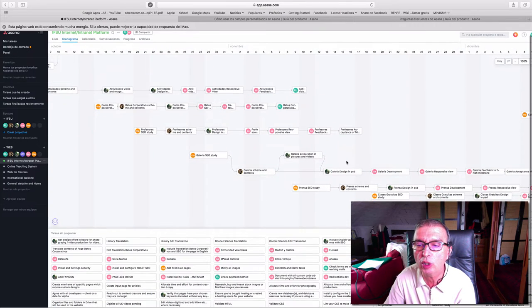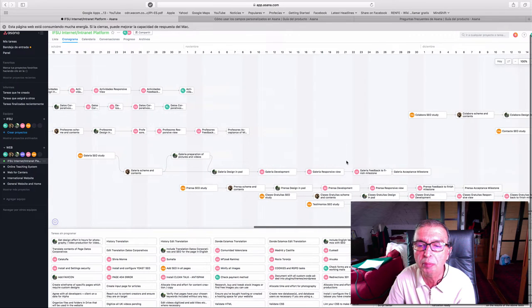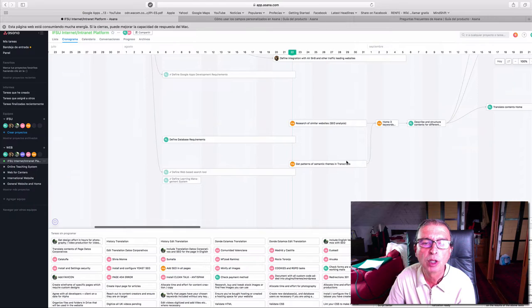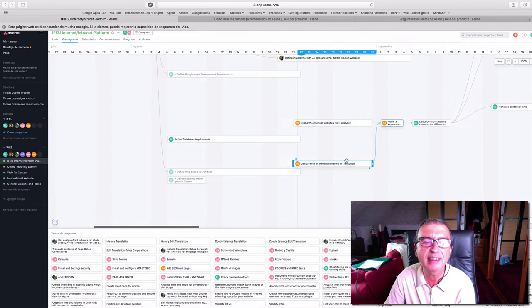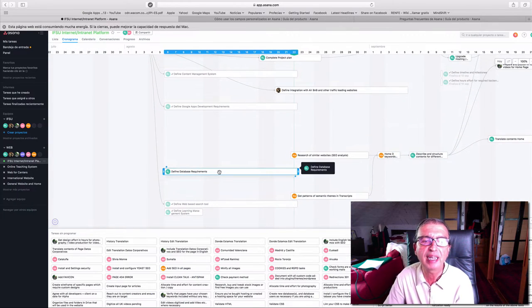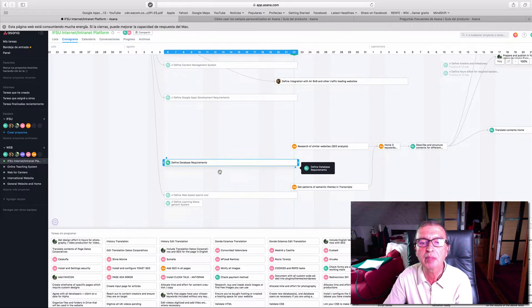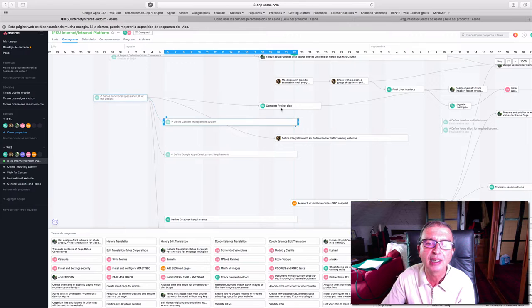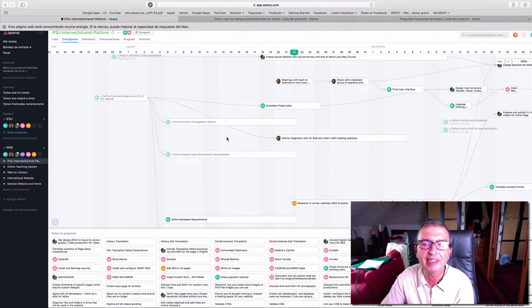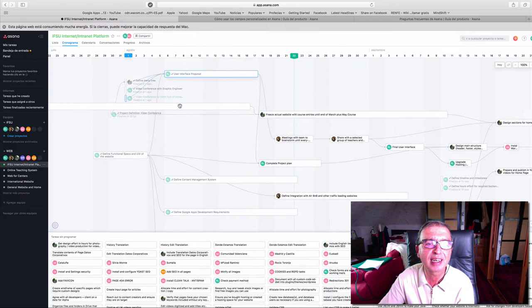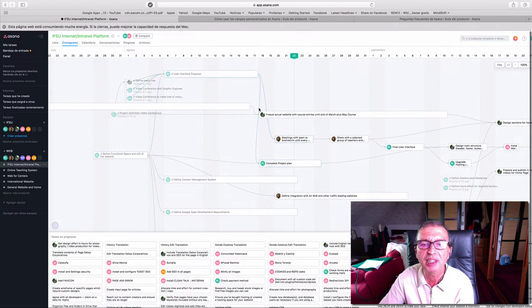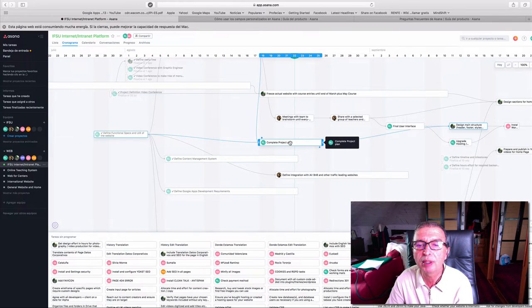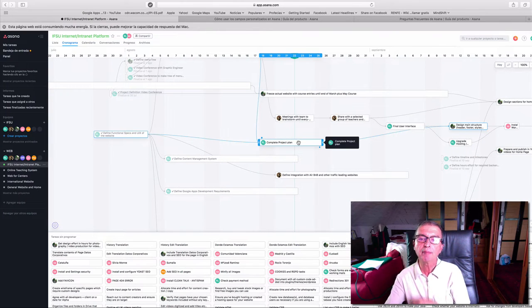This is where we are up to with the website. We still have not finished the project plan phase. We still have to define certain database requirements. The tasks that have been finished are in gray mode.